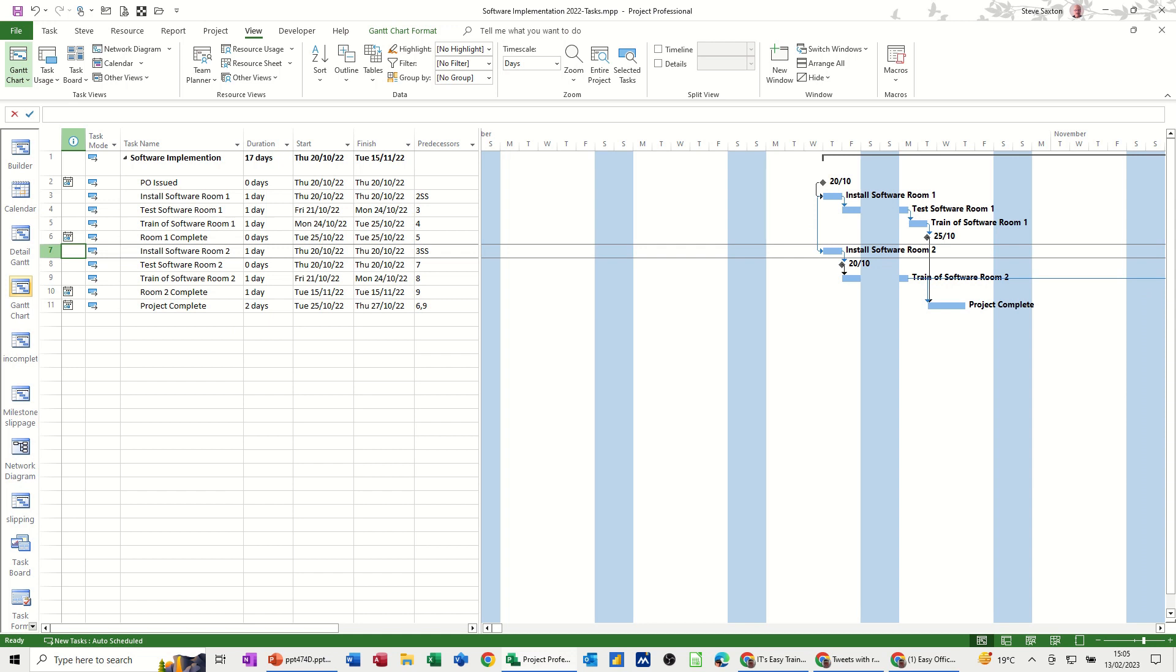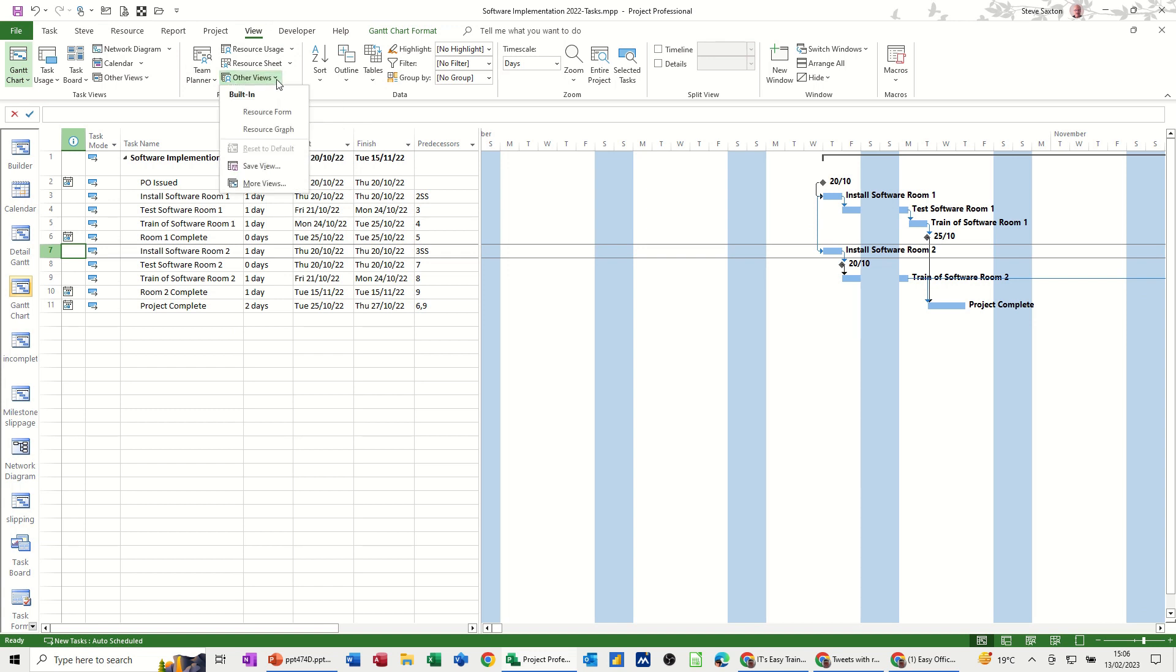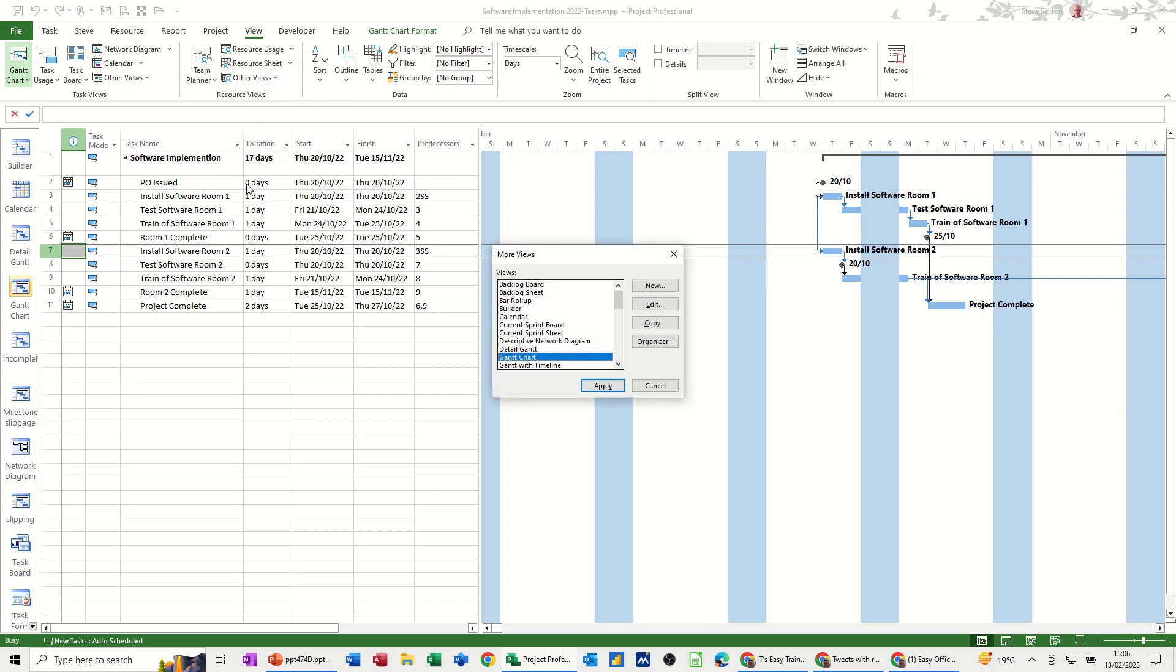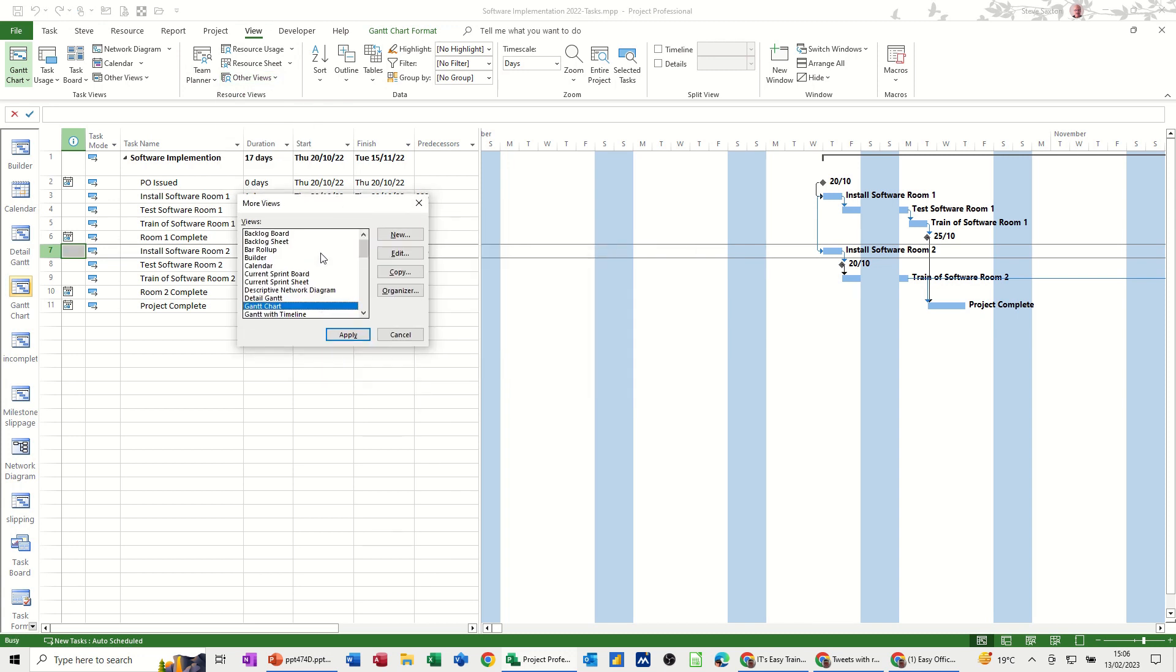Now to create a view you need to be on the view tab and then you've got this bit here where it says other views. If you go into there and then you've got more views and there this is where you create the view. So you've got all these preset views some of them are on here some of them are not but if you click any of these they will then appear on there.